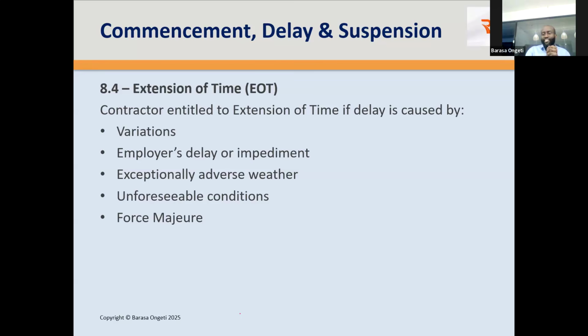And you may have what contractors love using, but they're always wrong when using this, force majeure. Many a contractor likes to jump on the force majeure clause. If you look at the force majeure clause, it's very stringent. It's very difficult for an event to satisfy force majeure. Would you believe during the 2020 COVID era, very few claims by the contractor passed the test for force majeure during COVID, mark you. Very few globally.